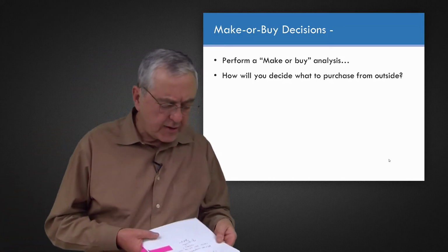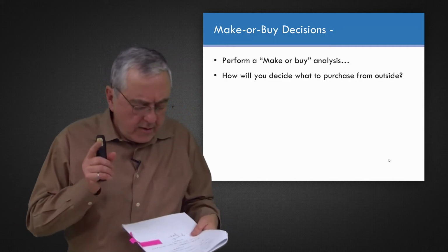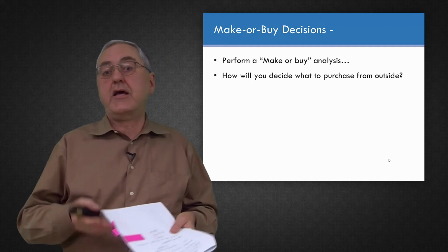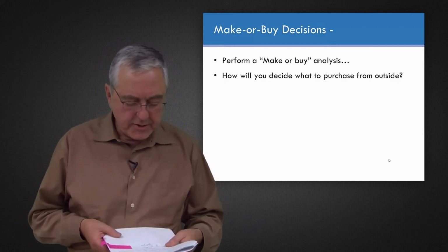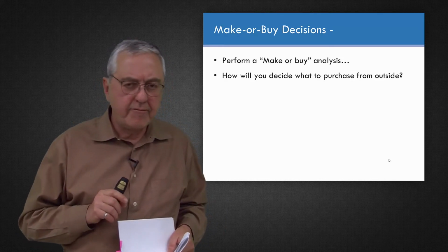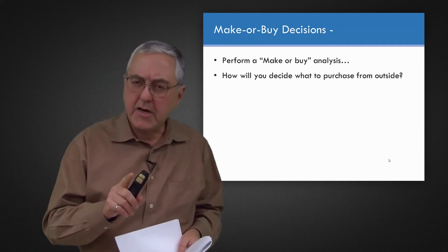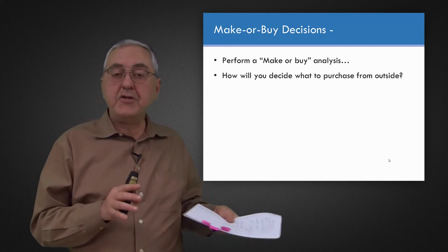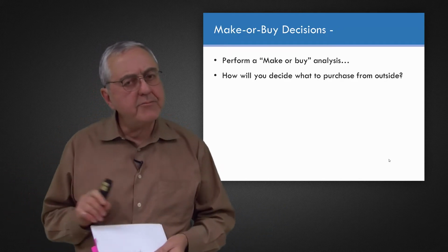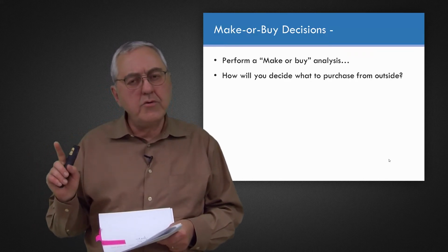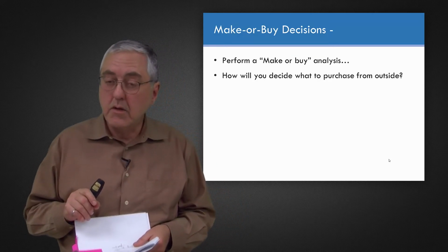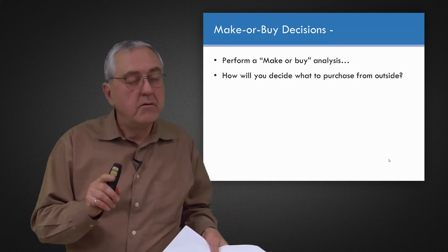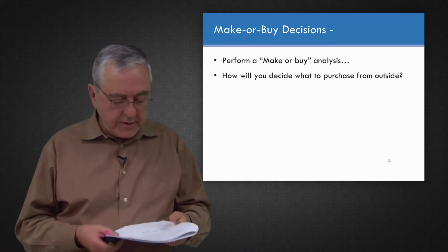Another thing that's a commercial kind of consideration, in a sense, is, let's say that in developing this camera for a space environment, you have a contract with your customer, which is, let's say, NASA, the American Space Agency. They've got some terms and conditions in that contract. For example, one term is that it will be a fixed price contract, and another term is that upon deployment of this space camera, you promise 10 years of warranty. Can you get the same terms from your supplier? Can you get your supplier to do that subcontracted work on a fixed price to you? And can you get that supplier to also promise a 10-year warranty from the time that you deploy the camera? If you can't, maybe you'll think about doing the work yourselves. That's something else that you're going to consider.